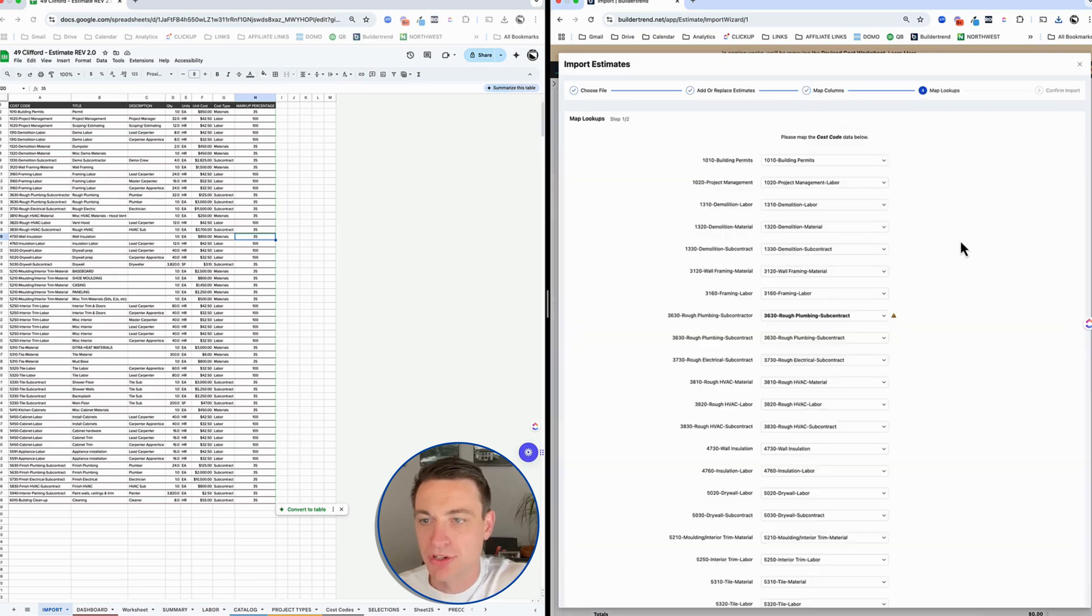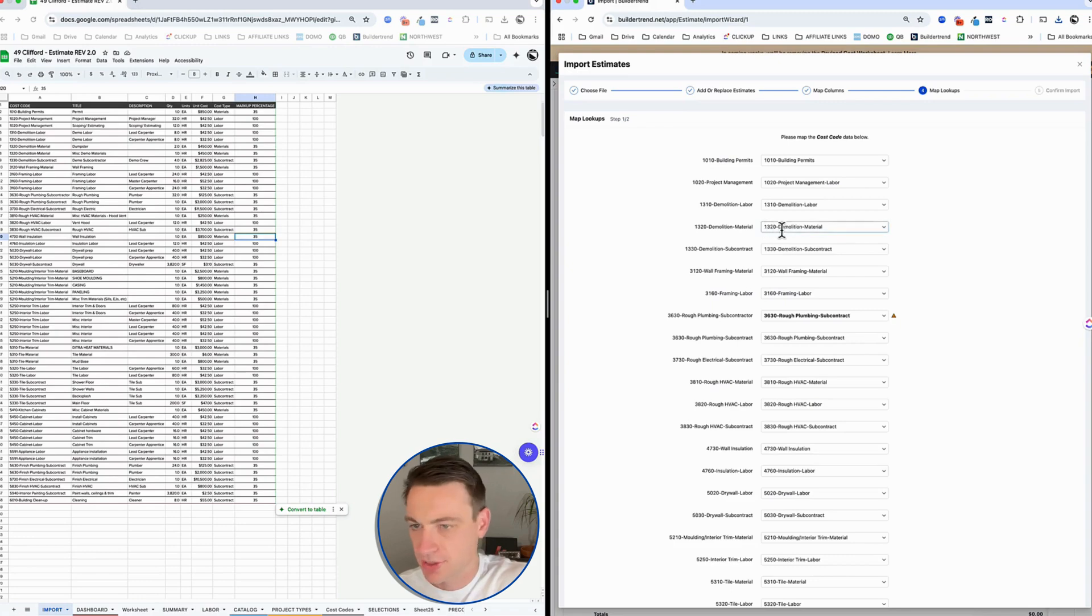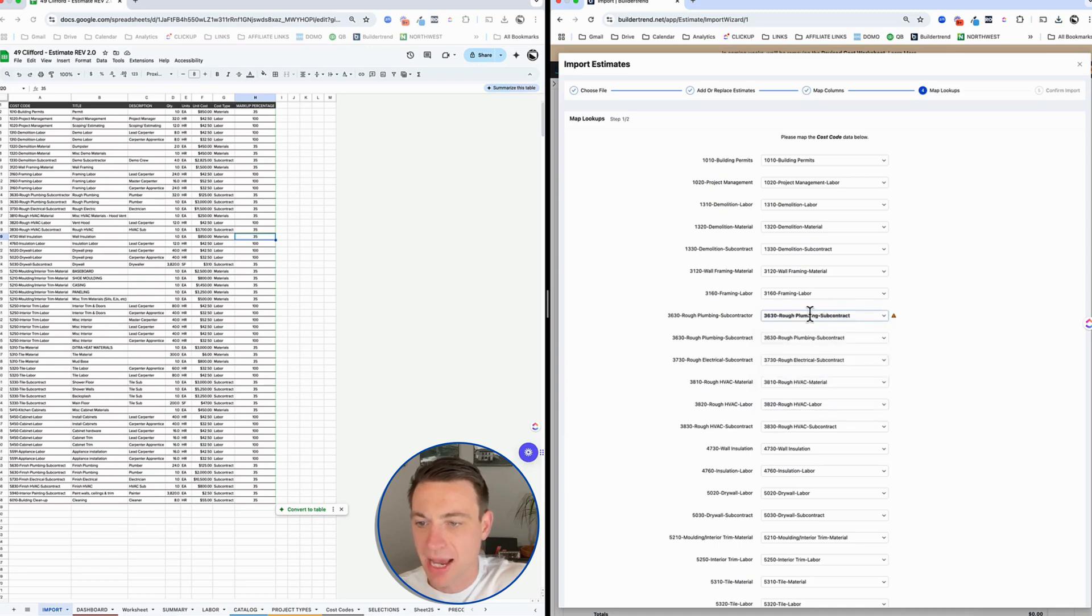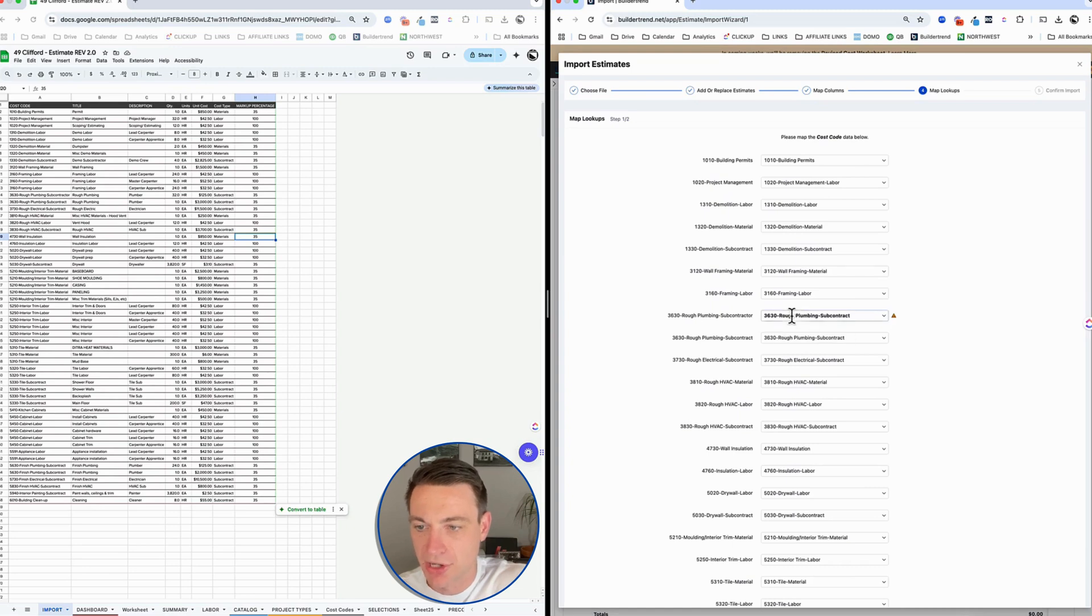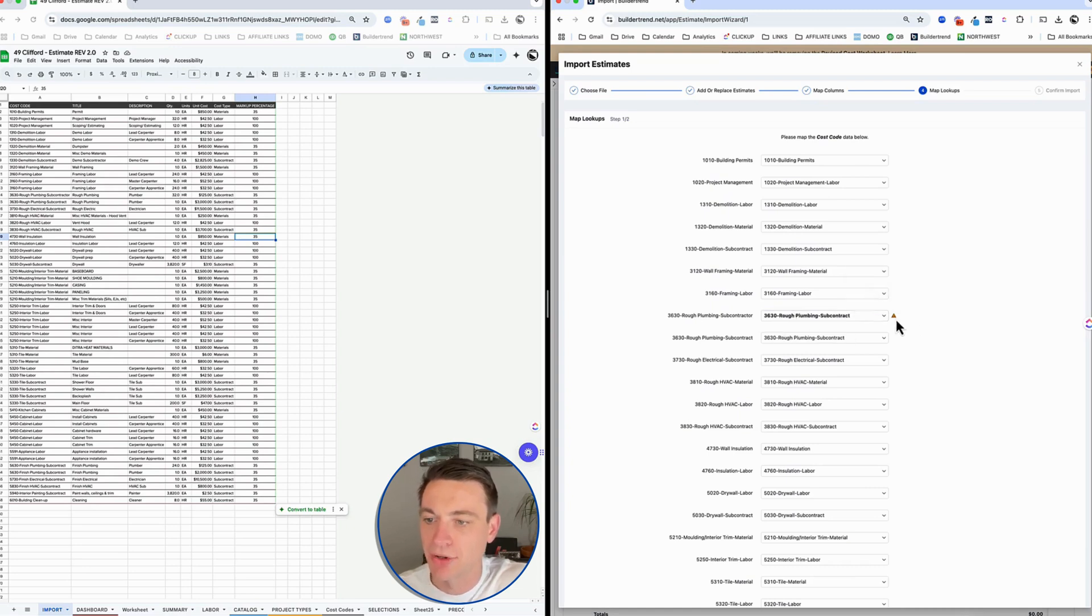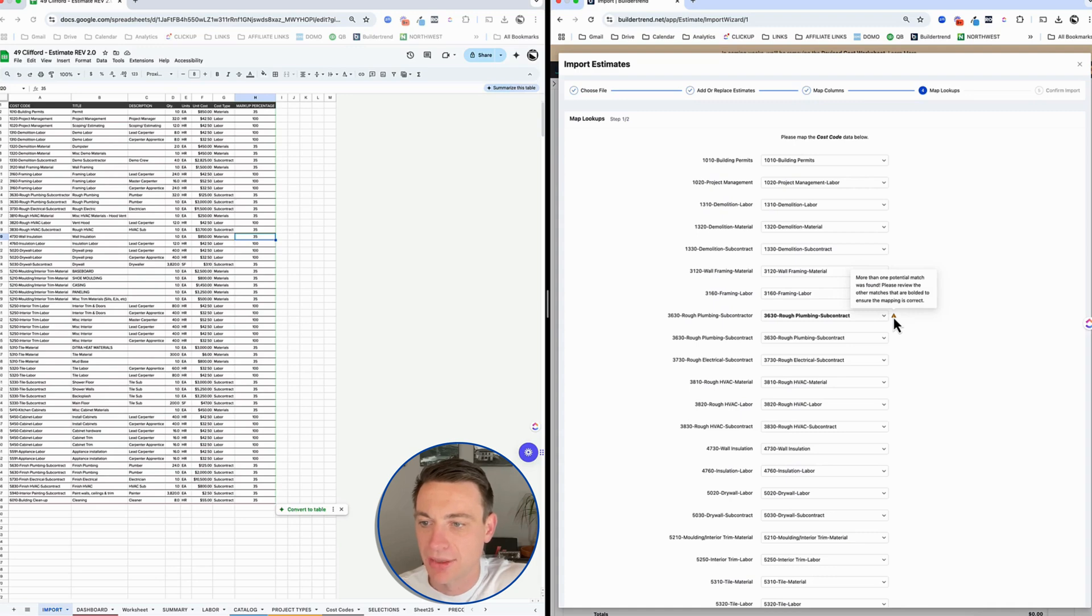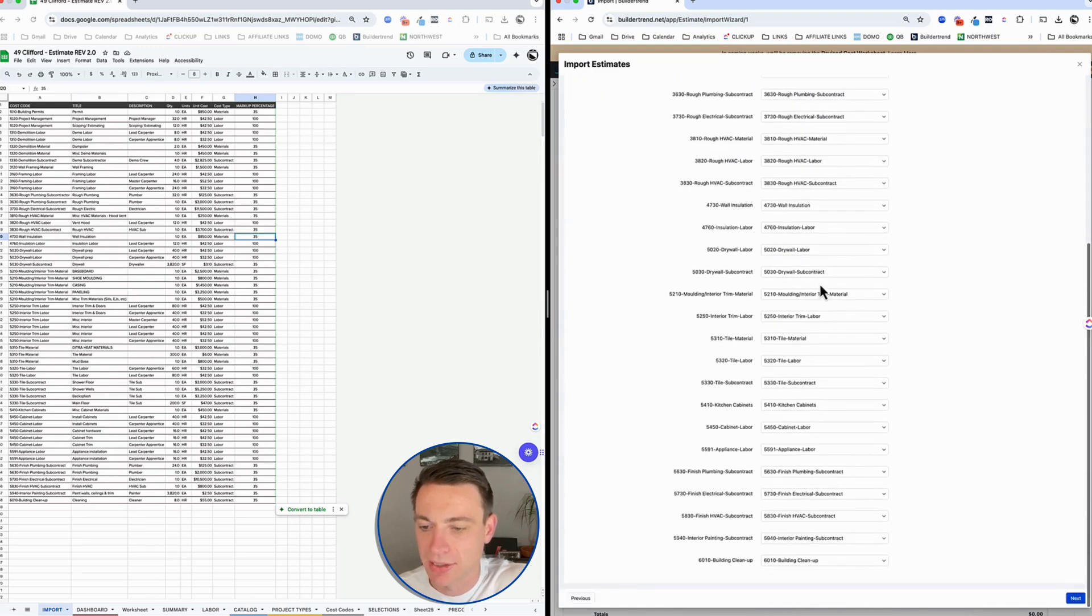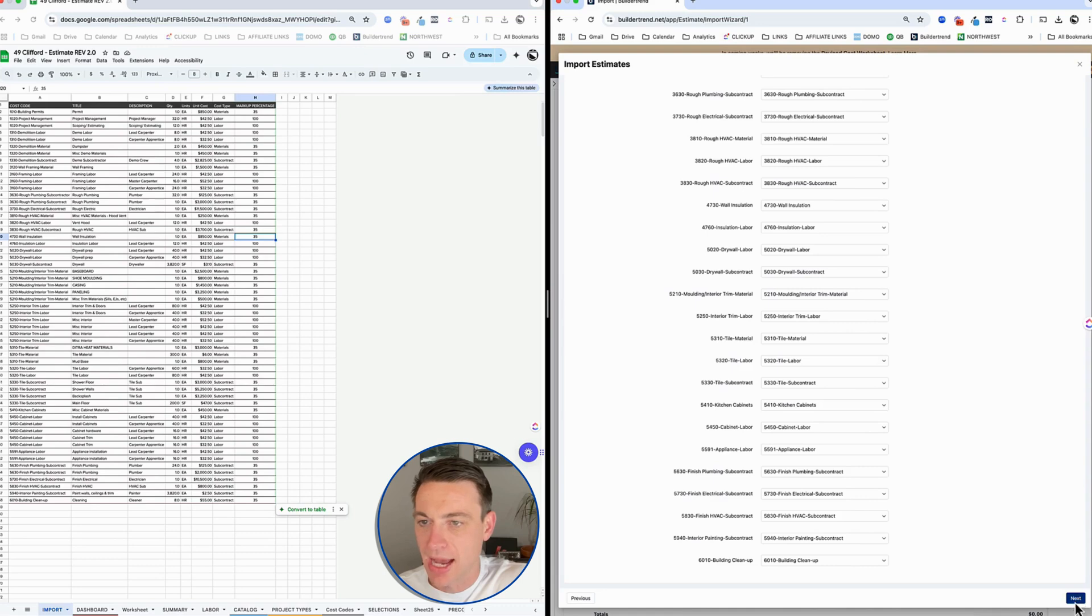Next, we're going to do some lookups. This is where BuilderTrend is looking at their cost codes compared to the ones I'm importing. It's finding any errors and it found an error - that exact rough plumbing subcontractor. It found it to be an error, but it's guessing correctly that we wanted to use cost code 3630. So it did a good job of guessing and it's just alerting me to make sure that the match is there and it looks good. Everything else looks good as well.